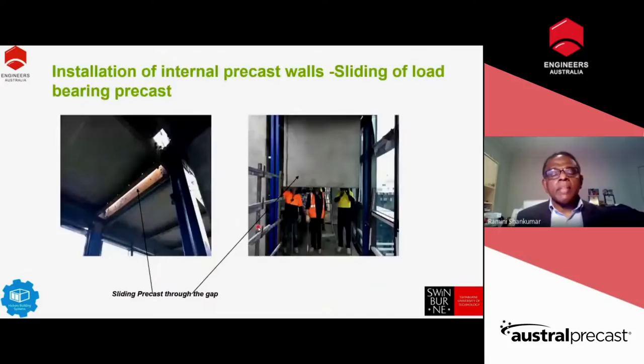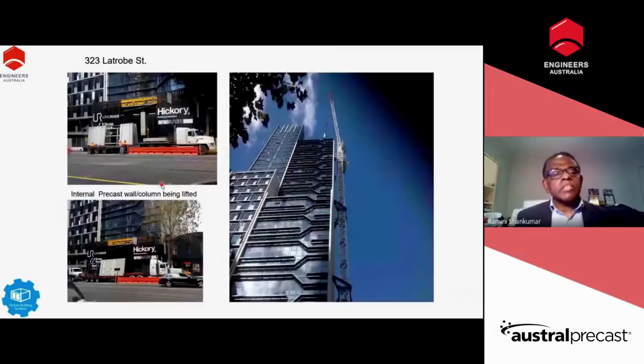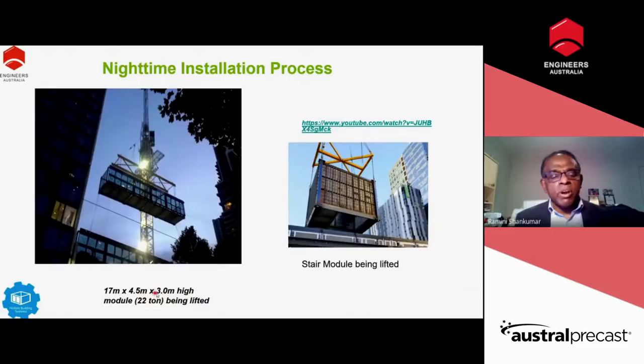And then I told you about sliding. If you need more load-bearing element, what we do is slide the precast through this gap and then bolt it. So we successfully finished the set. In the daytime, we bring in all the precast, internal and external. And at nighttime, we bring that monster, which is a 17 meter by 4.5 meter, 3 meter high module, 20 tons, being lifted in the night. It's a pretty simple placement during night.